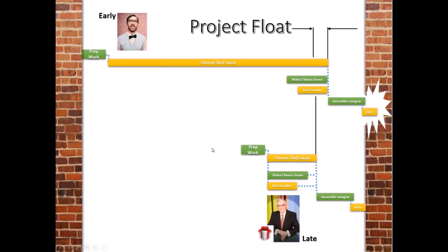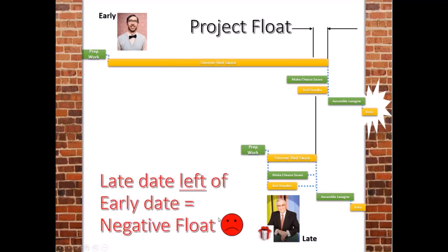So if you've ever looked at a scheduling report and you've seen dates and you're saying, why are the early dates later than the late dates? Well, basically your early schedule has been crashed into your letting wall, which is not a good thing.